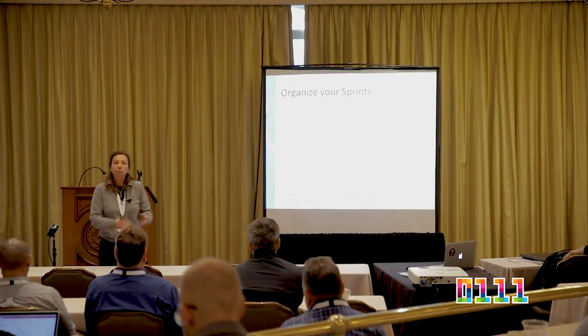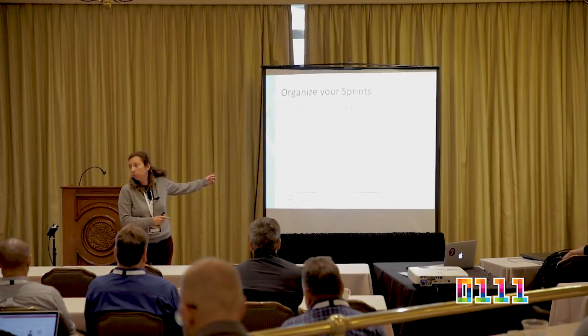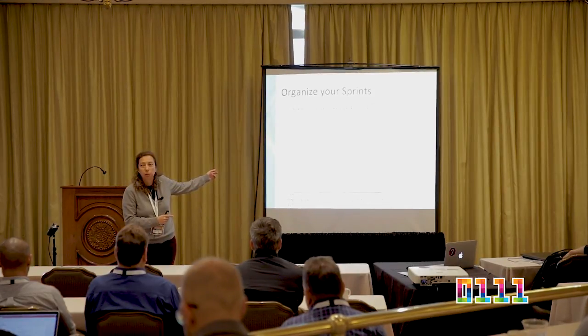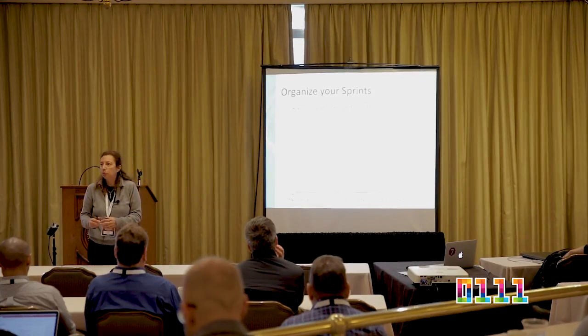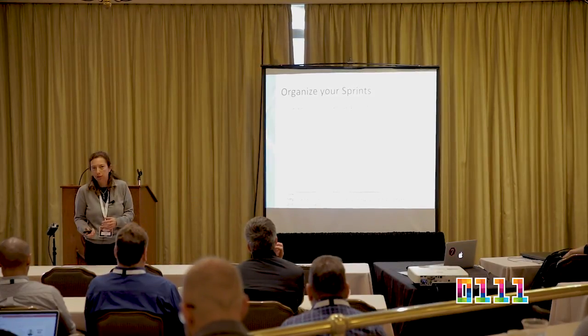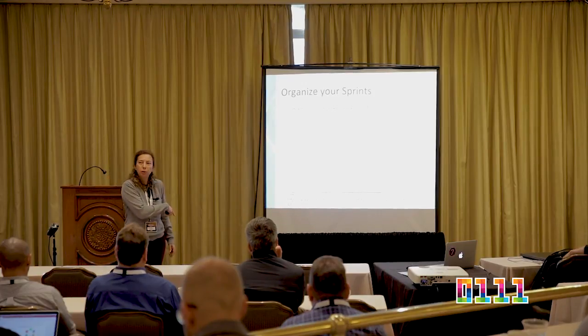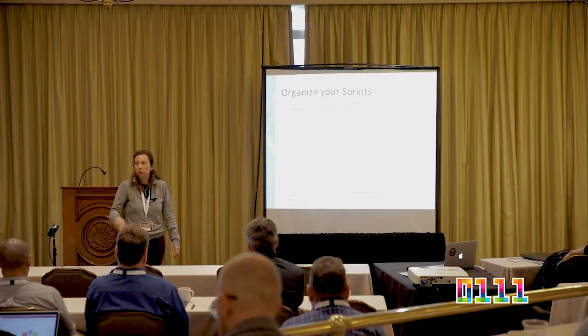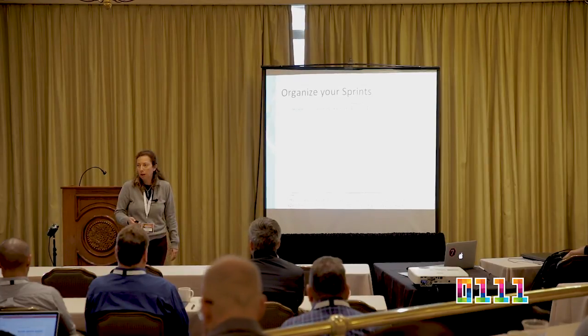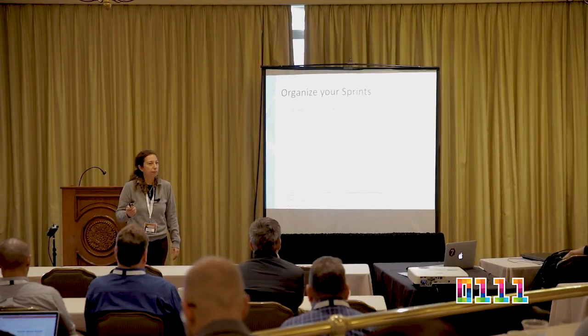Your prototype may not be ready for test, and that's why it's important to build your sprints. But once your prototype is ready for those types of tests, you test it and you continuously test it, so that you don't get to the lab, you don't get to TUV or NEMCO and fail your test because you neglected to test it in-house. Does that make sense?